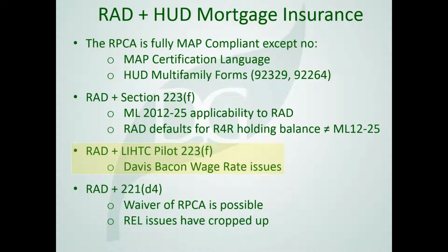One of the problems with RAD and the LIHTC pilot is the RAD program statutorily requires Davis-Bacon wage rates be used for all construction costs. Under the LIHTC pilot, Davis-Bacon is mitigated, but it cannot be for RAD projects, so please be aware of that nuance.